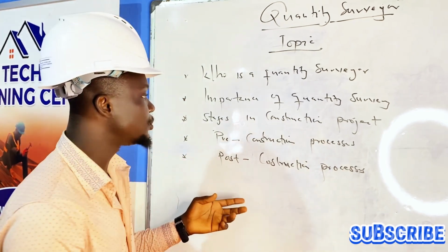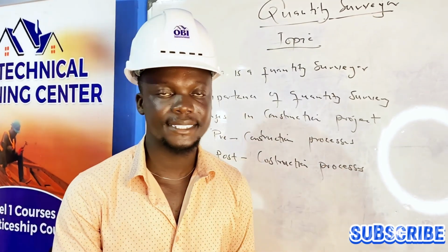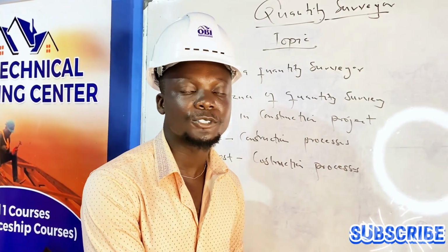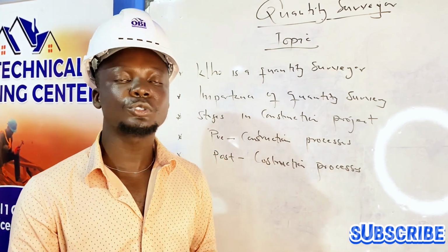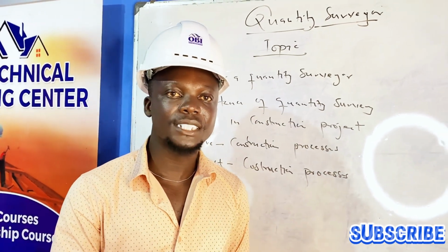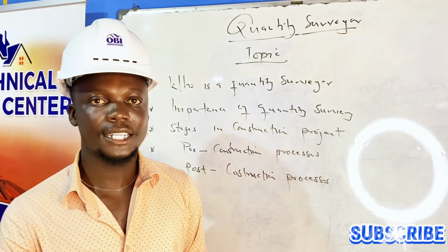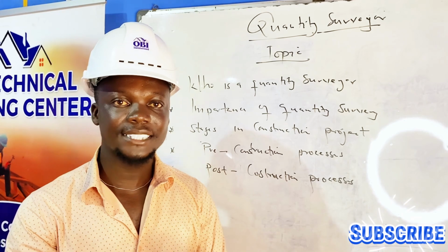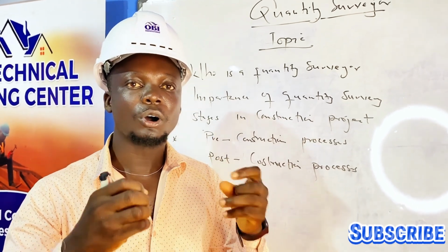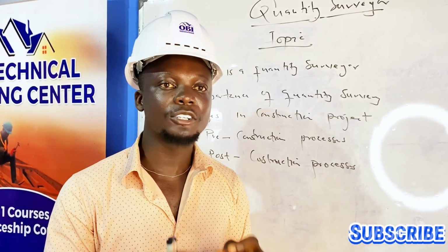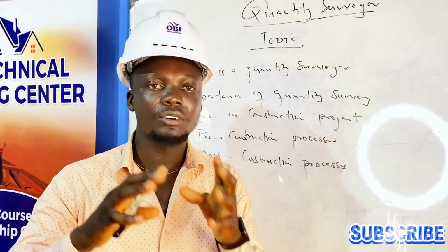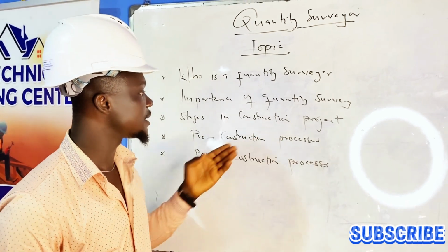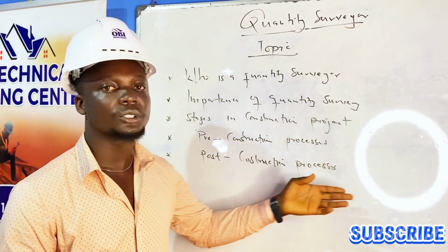In the tendering of the project, every contractor will bring their price, and that price will be related to what the quantity surveyor or the private consultant has prepared, in order for you to know whether the contractor bringing the project is over budget or under budget. So you realize that the quantity surveyor in the construction industry guides the client or the consultant or any other person who is taking the project in order to save costs and to choose the right contractor for the right work. So now, from the pre-construction stage, we go to the post-construction process.